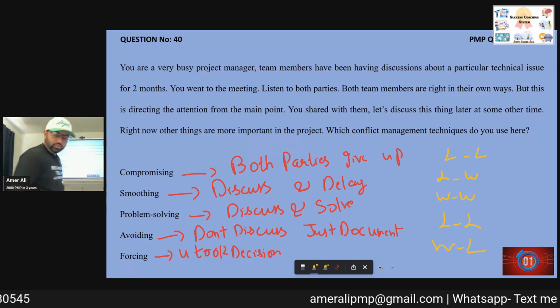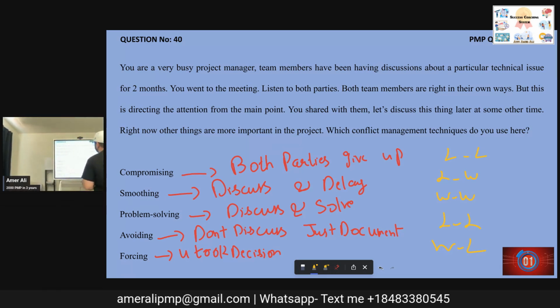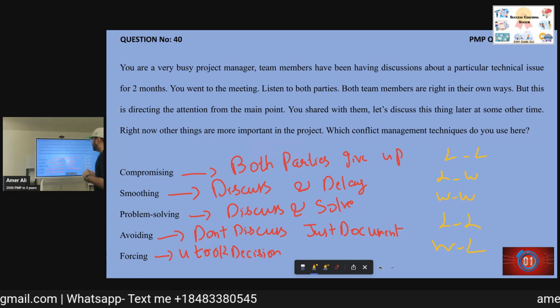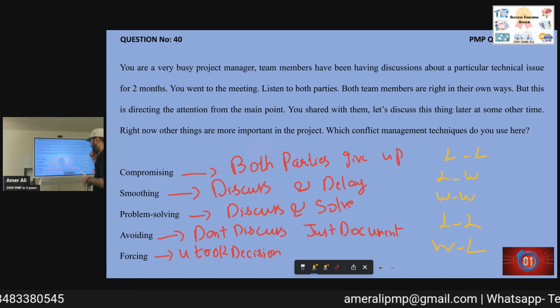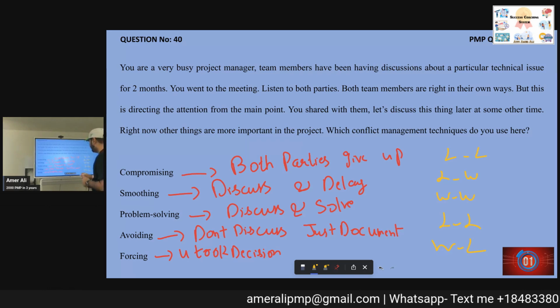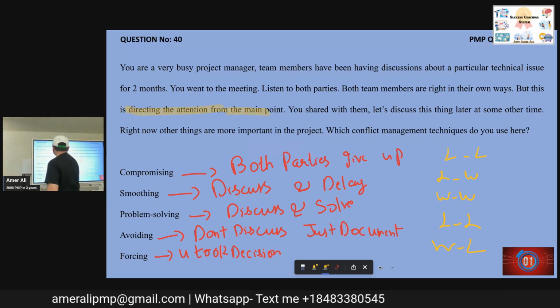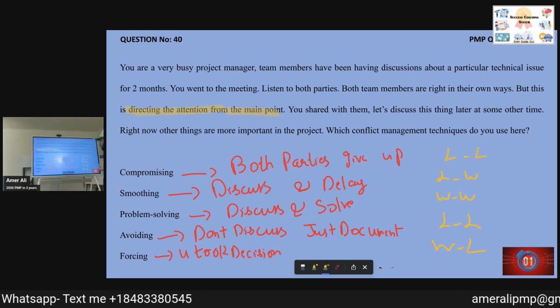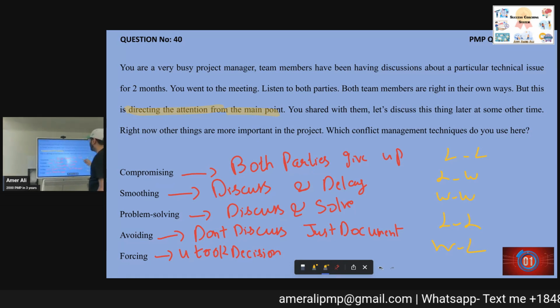Okay, so let's go into the context of the question. You are a very busy project manager. Team members are having a discussion about a particular issue. You went to the meeting and listened to both parties. They are right in their own way, but attention is directing, this is a keyword here, away from the main point. You shared with them, let's discuss this thing later at some other time. Right now, other things are important. So you are delaying the conflict.